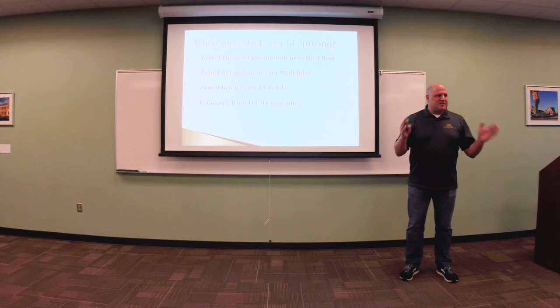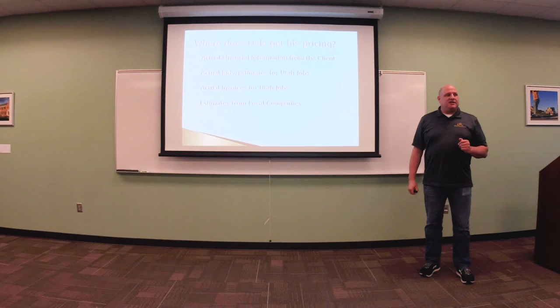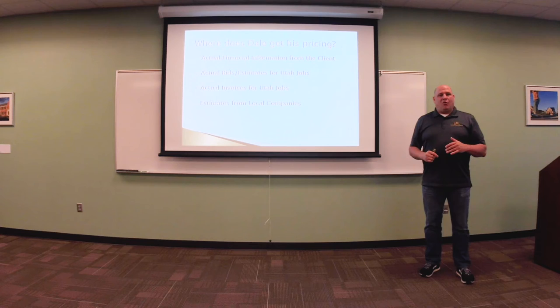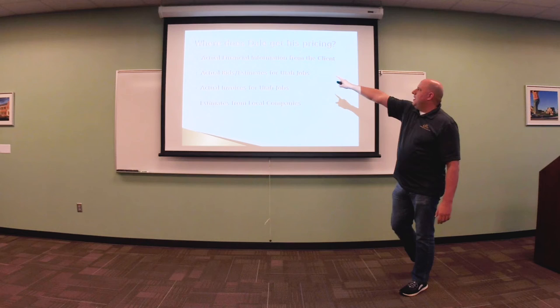We specifically do not purchase or use those because they're not as accurate as what we do. We use actual financial information from the client. Let's say you just painted your community and it cost $100,000. Well, I'm going to put in there that you just spent $100,000, so the price is $100,000. Or I could go to the guidebook, and the guidebook says you should have only spent $85,000. That doesn't make sense to put in there. Or maybe the guidebook says you should have spent $115,000. So we're going to use the actual information we have from the client.